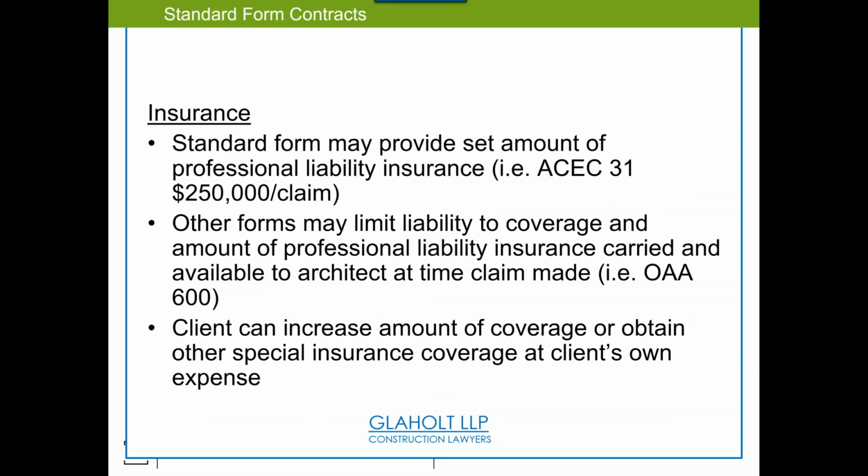Our contracts call for insurance as well. There's a minimal amount of insurance, 250 grand, that's carried usually by any firm. And without that insurance, we simply can't practice.